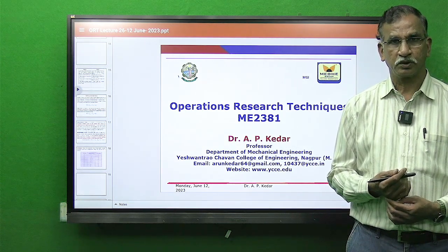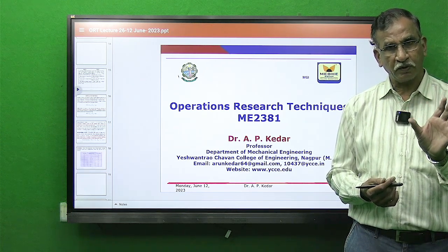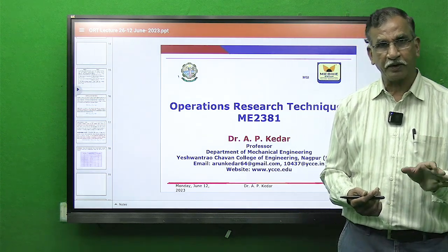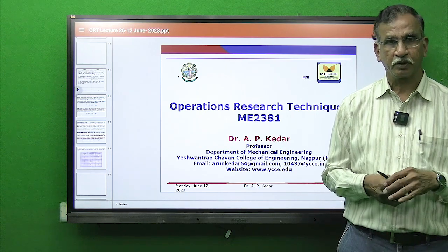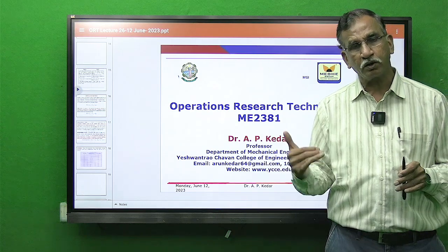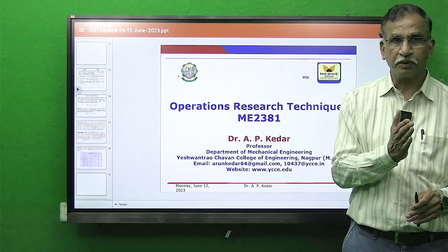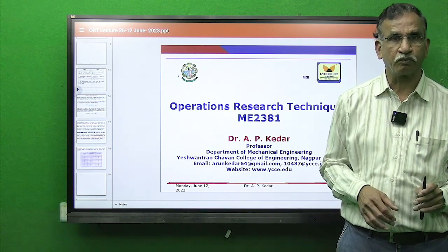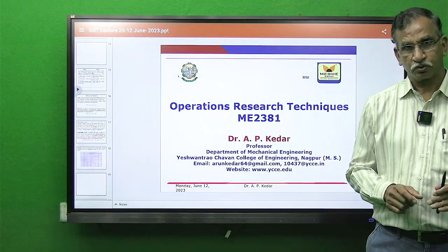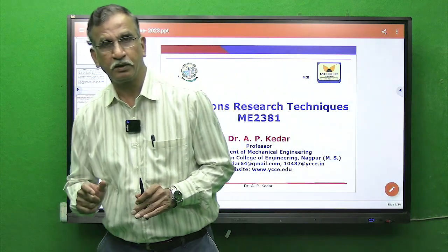The early part of the evaluation for PERT and CPM, till finding the critical path and the expected project duration, is the same. So what is the difference? In PERT we find the probability of completing the project, or we find the schedule time given a probability. In CPM we find different types of floats. So first, it is essential to understand what we mean by float.